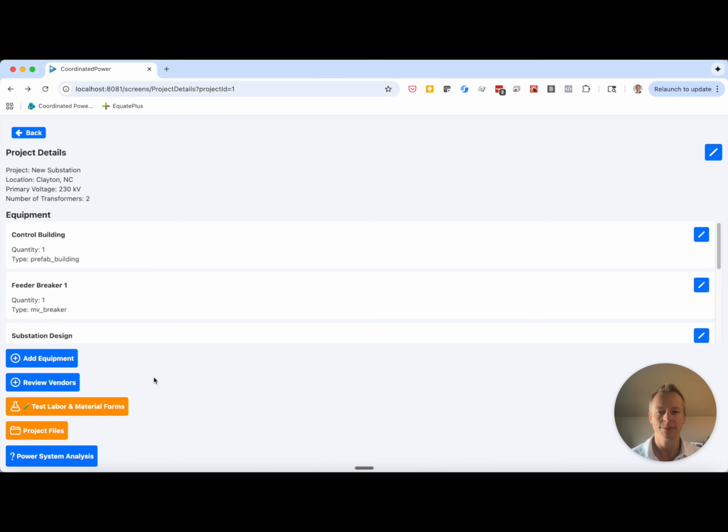So kind of the concept is, everything's in the database. It's all vectorized into the database that way, so the data is not duplicated and re-entered. And really, if you know what you want, you can issue a transformer spec in a day. When you're kicking off a new project, a lot of times, transformers are long lead, especially high voltage breakers. They're very long lead items.